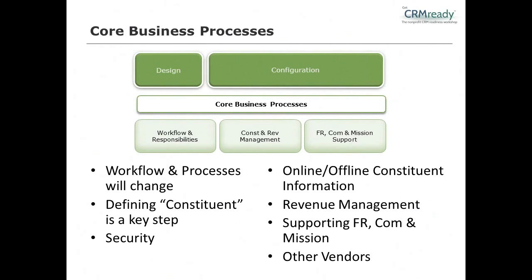I think that's spot on, BJ, and part of what I would add to that is that the time spent is not just the practical time to gather the information and make some conclusions. Spending the appropriate amount of time to plan is part of the change management process. It takes time for people to digest. What are we doing here? What does it mean for me, for my department, for the organization as a whole? You have to let those conversations happen. They're important conversations, and if you don't give them time early on, those conversations will creep up as doubts throughout the project. So the time you spend planning has both a practical and I guess sort of a political importance that you want to give its due.